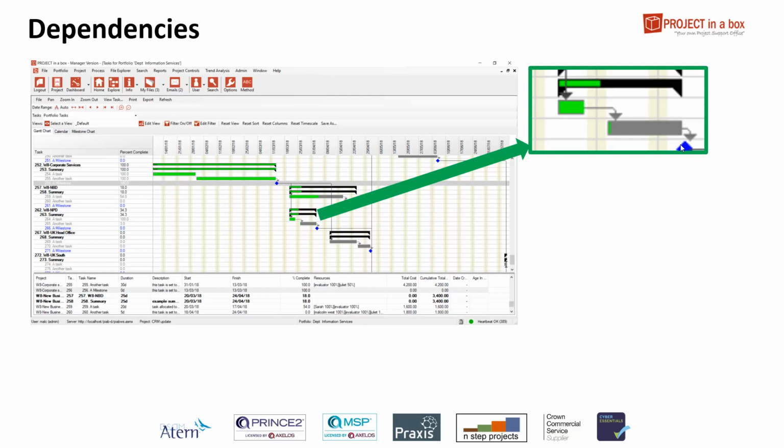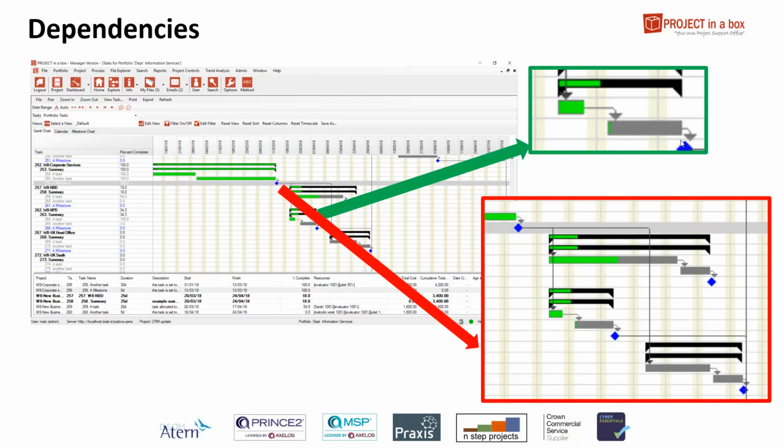We also, though, allow you to do something really interesting, which is to have a different type of dependency within the main system. And that's an example here. This dependency, or in fact there were 3 different dependencies here, this task, and this task, which are in 3 different projects, are all driven by the combination of this task, which is in a preceding project. So these are what we call intra-plan dependencies.